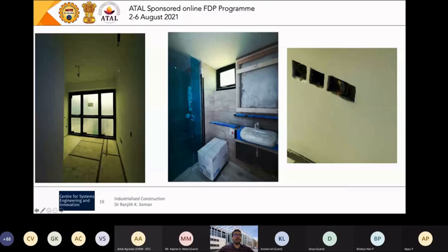If you look inside the module, it's almost completely finished. Here you could see a little bit of lining over the floor, but the flooring is completely laminated and completed. You have all the appliances installed. For instance, the wash basin is installed, the toilet seat is installed, the shower, all those plumbing appliances. All of these take a lot of time on a construction site, and the finishing work is challenging, so all of those are installed. Yet we leave some of it open. It depends. Some companies do it completely. Some companies leave a little bit open for the customers to choose from.